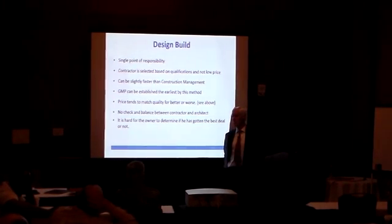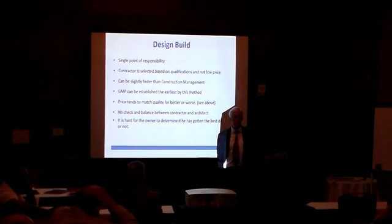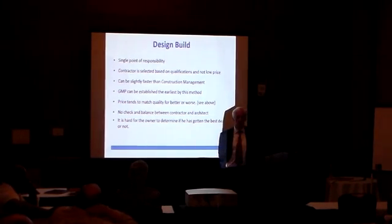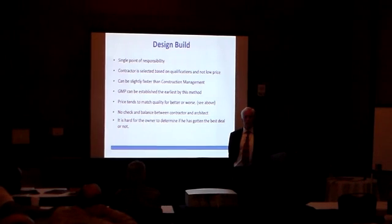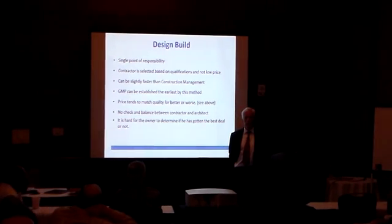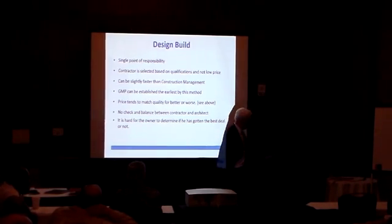Okay, so we wouldn't buy a bridging set of documents or something like that to define the job? You can do that in the RFP. You do that in the RFP. We have a really good design-build RFP that sets out the program for the contractors. But we also put in our design-build contract that we get to okay their selection of architect or designer. So you can modify these contracts to whatever you want.